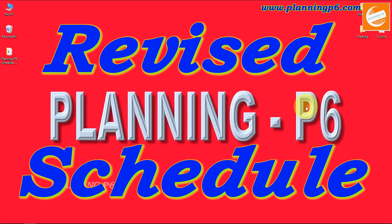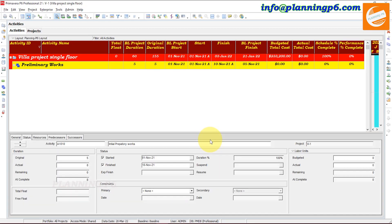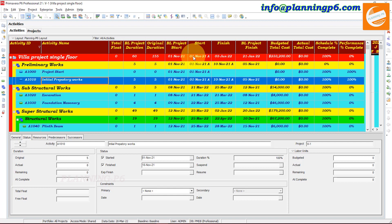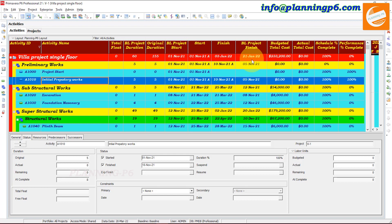Open your Primavera P6. Suppose this project was initially planned for 60 days, and now the duration has exceeded to 155 days. In this project, the baseline start was 1st of November and it actually started, but stopped due to some reasons. After the completion of two activities, the project was suspended or closed for some time. Then we get the new project finish date of 21st of January 2022. We apply for the extension of time — as I described in another tutorial, you can watch that.